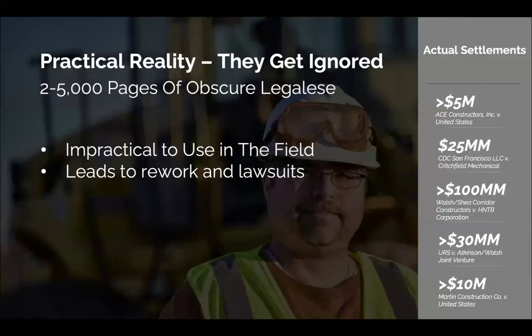Now, the reality of what I just said, and again, I'm a little biased here because we spent time trying to solve this problem, is specs get ignored a lot. I mean, obviously in the beginning of a project, they don't, but once you're 6 months in and things are busy, yes, you'll send someone to go look for the specs, but we all know that doesn't always happen. So a lot of what we're asking is, great, can AI help with that? On the right-hand side of this, these are actual settlements from a lawyer that I know. So, this really can be a big deal, and each one of them was caused by someone ignoring the spec.